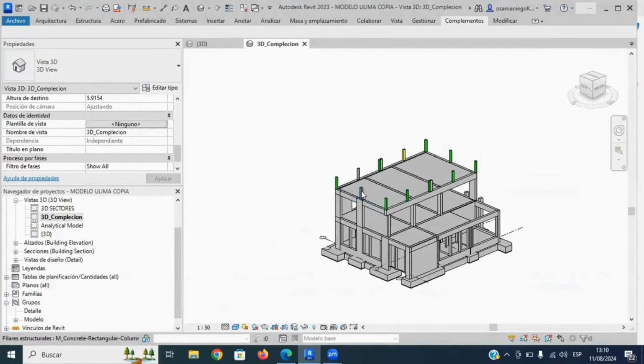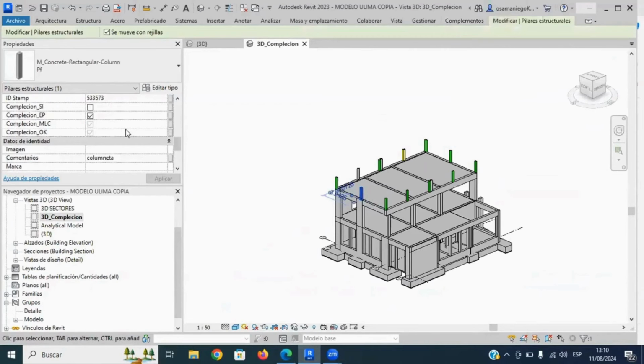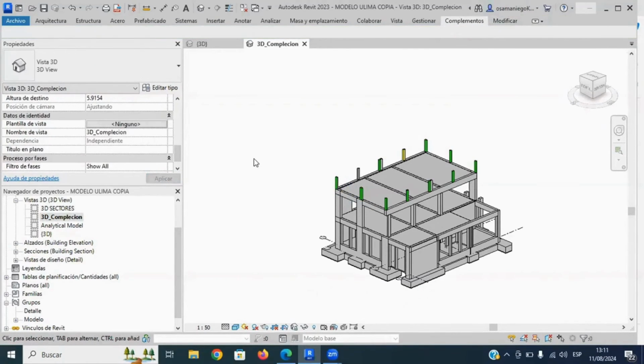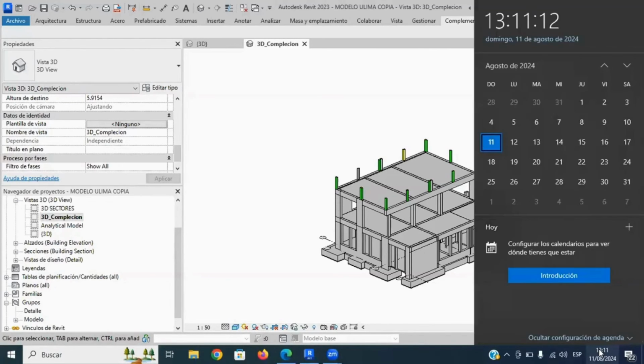Next, we get back to the BIM model and will change the state of a small column from WIP to complete, also called OK, and observe the subsequent outcomes. Visually now, there is only one deliverable in WIP state and 10 deliverables in OK state, and this is what we expect to see in the synced database. Now, we wait until the app automatically syncs the data.